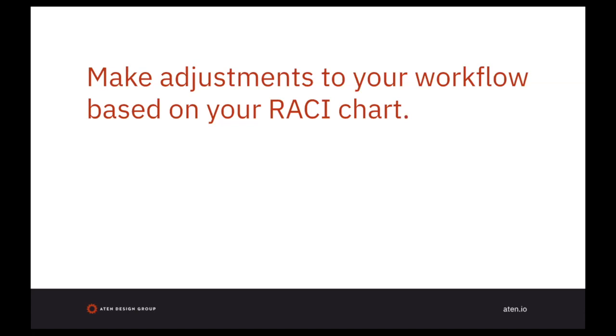Does the RACI chart indicate that a stakeholder group needs to review wireframes? Mark that on your roadmap or proactively schedule those meetings. Do you want or need to vet wireframes with the end users? Create that space for testing. Do you need to share visual design comps with a secondary stakeholder group? Mark that as a to-do at the right spot in your schedule. Or do you have to include a mandatory legal review? Find out how long that might take. For example, we're currently working with a group that requires a 4-week window for a security scan. This is absolutely something you need and want to plan for.